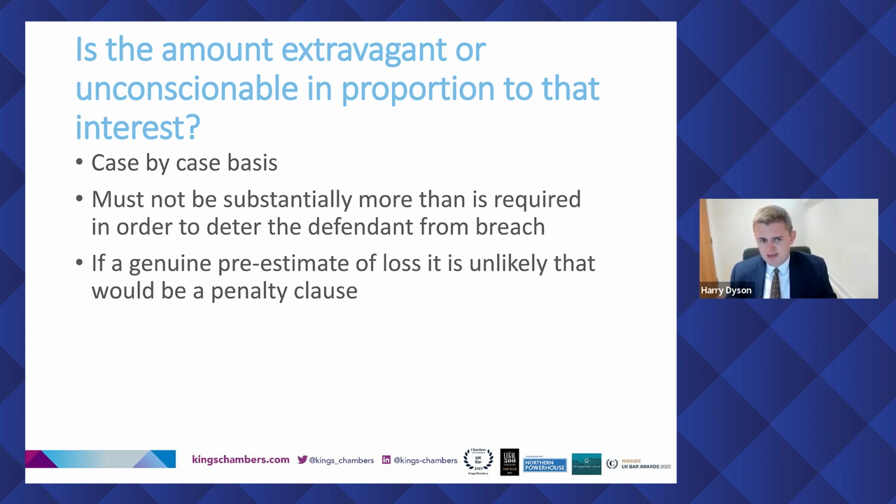The last point I make here is that if it is a genuine pre-estimate of loss, and your client can go along to trial and say, we've worked this out, this is how we've come to that figure, there it is, that's going to be fantastic. Really, really is going to be fantastic evidence, and it's really probably going to get you home on this point. But it's not necessary to be able to do that.